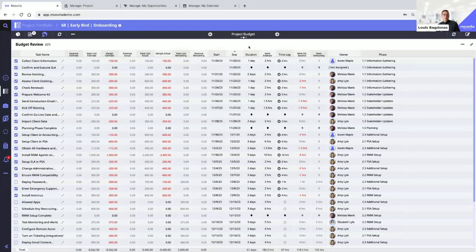We understand that. Maybe we build that into our recurring cost for that customer, but we can say, hey, we estimated it was going to cost us about $8,500 with all the hours. What's it actually been costing? This would be a quick, easy red flag for me to say, all right, I'm $9,400 in on this onboarding. I budgeted at 85. I've only finished 50% of the tickets required. I'm going to be going over.